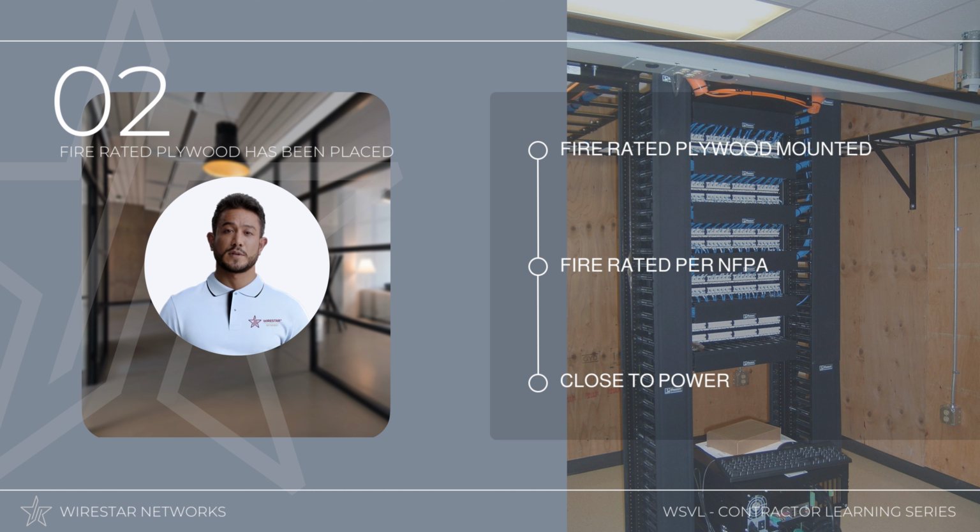The plywood should be located where dedicated power has been installed and data cables have converged into the room. Additionally, the location of the plywood must not be obstructed by other mechanical fixtures, equipment from other trades, or clutter upon our arrival to install or maintain the network. In the event of a network emergency, efficient access to the data racks is an important part of restoring services quickly.